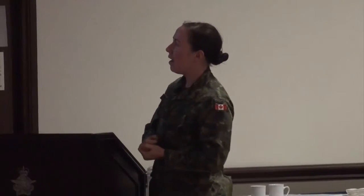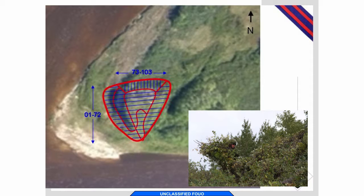That was also important because our medevac capability could only support 2 Pri-A casualties at any time, so we wanted to make sure that in the case of an unintended explosion, we wouldn't be pushing them any more than that. This grid system was really helpful for just documenting what we found. It made it very easy.